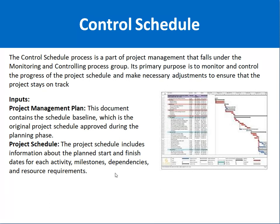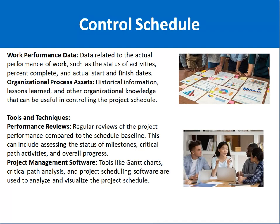Another input is the Project Schedule, which includes the planned start and finish dates for each activity, milestones, dependencies, and resource requirements. The Work Performance Data is also an input — it represents the actual performance of work, including the status of activities, whether they are complete or not, percent complete, and actual start and finish dates. Organizational Process Assets include historical information, lessons learned, and organizational knowledge from past projects.